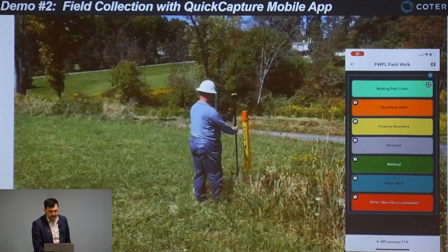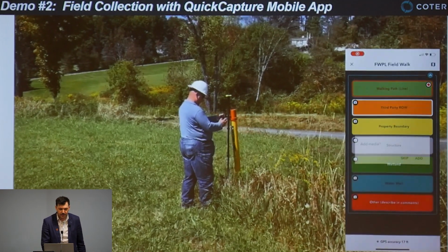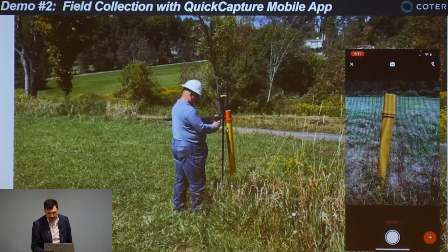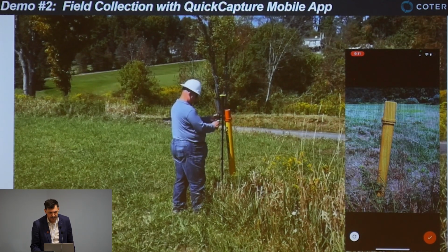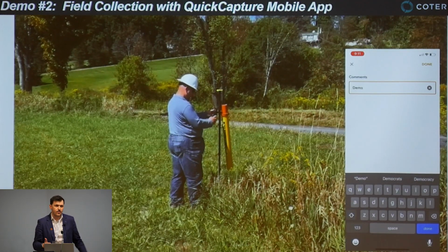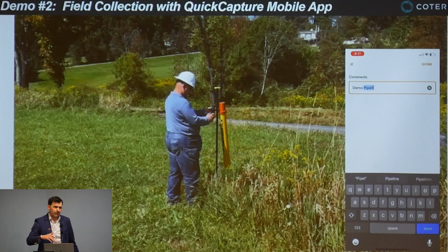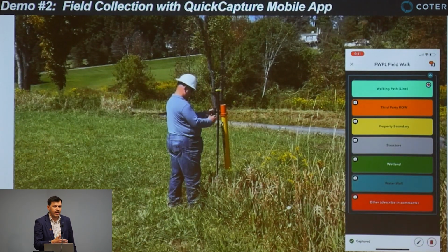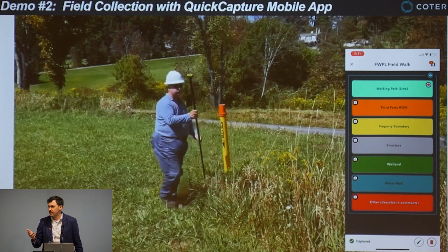And I'll play the video here. So you can see our midstream engineer walking up to record the location of this buried gas line marker. And this is something that we want to take note of. All these water lines are overland lines, so they can go over buried line rights of way pretty easily, but we still need to record the locations of them and coordinate with whoever owns the right of way before we build on them.